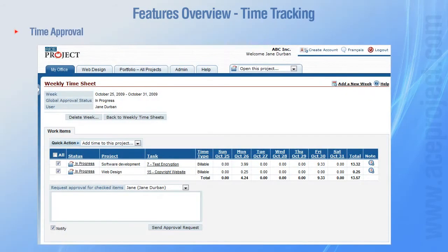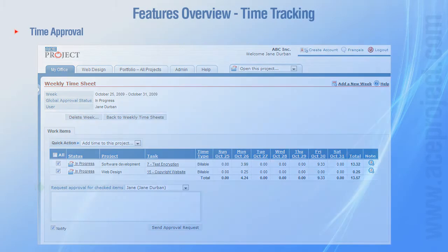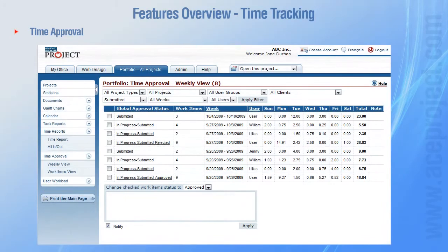Once filled out, a timesheet can be submitted for approval to a project manager. Approved hours are computed as actual hours, while rejected hours are not.